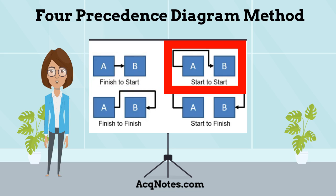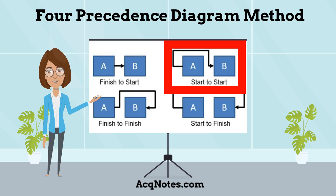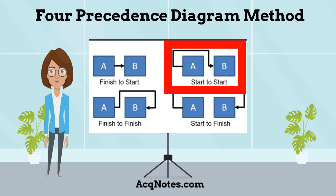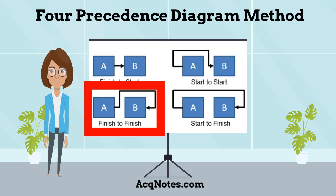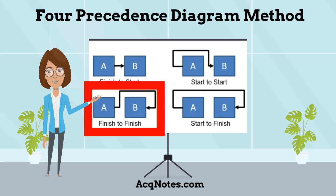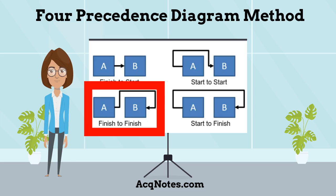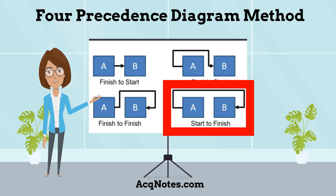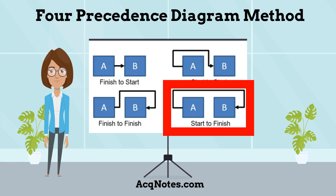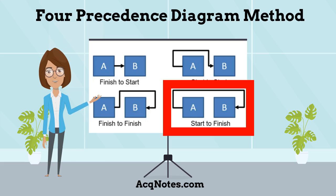Start to start — in this dependency, there is a defined relationship between the start of activities. Finish to finish — in this dependency, there is a defined relationship between the end dates of activities. And finally, start to finish — in this dependency, there is a defined relationship between the start of one activity and the end date of a successor activity. This dependency is rarely used.